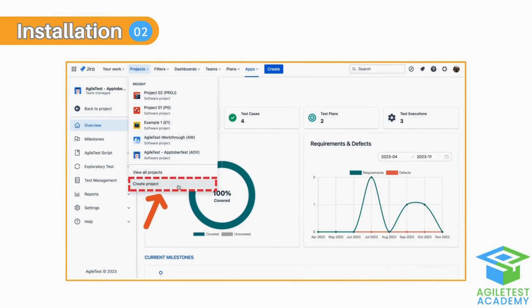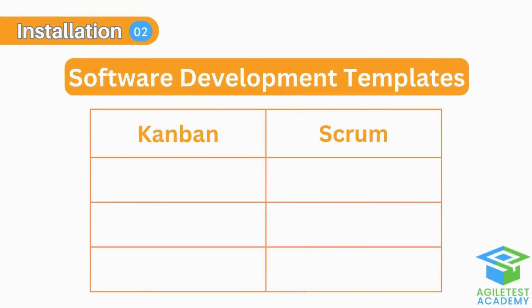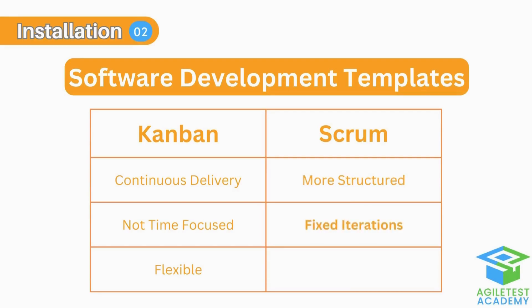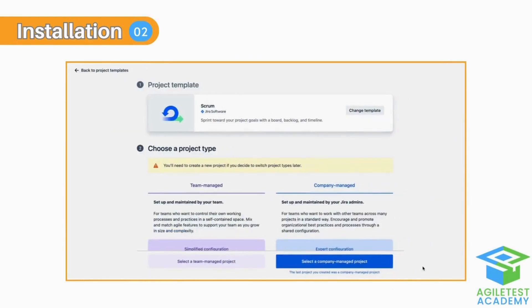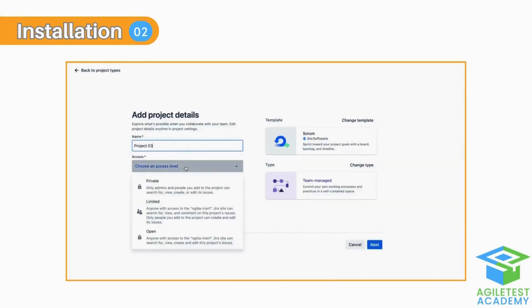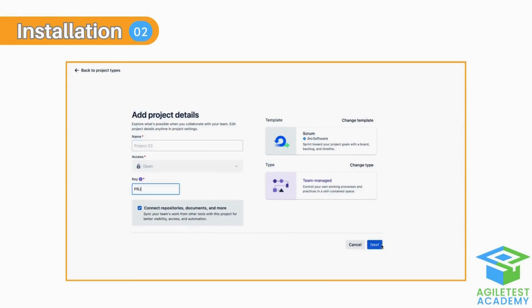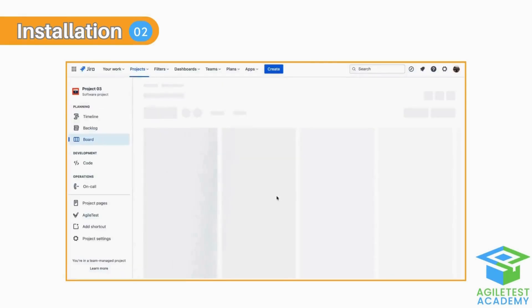Let me walk you through from the beginning. When creating a project, you are presented with these project templates. In short, Kanban is more about the continuous delivery of work, not necessarily emphasizing timed iterations, making it flexible to change priorities on the fly. On the other hand, Scrum is more structured, with defined roles and fixed iterations, focusing on delivering a shippable increment at the end of each sprint. For this video, I'm going to choose Scrum to utilize the sprint feature of the Azure Test app, since users in Kanban cannot fully utilize all of the Azure Test features such as sprints. But the good news is that users can toggle between the two templates, if and only if the project is company-managed.